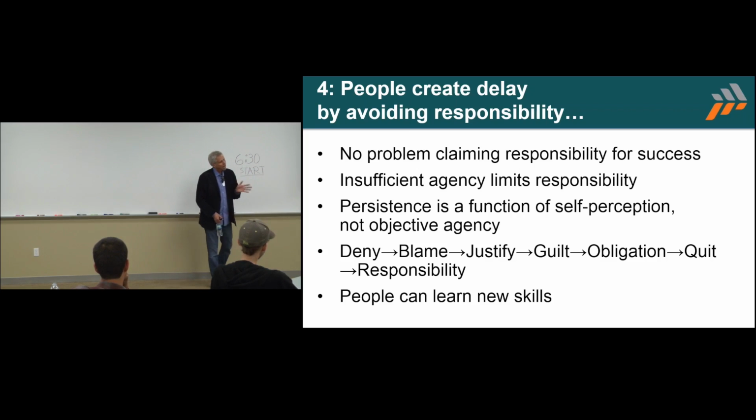And then the last thing is limiting work in process, meaning having a short sprint time. The problem is if you make the sprint too short, you sacrifice the other things. So, for example, if you make your sprint too short and you can't actually produce a shippable product, you have lost a very good metric, which is how many usable things can we produce in a time period.